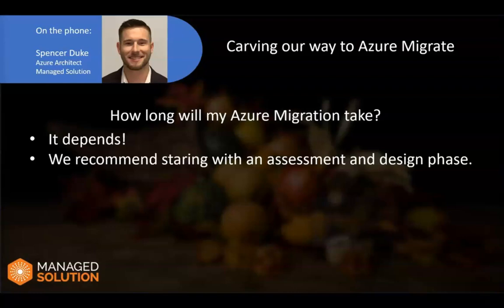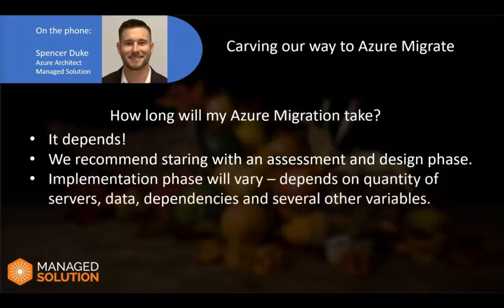And obviously, as far as how long a migration takes, it's going to depend on if you're talking about 10 servers or 1,000 servers. They're very different. That typical project process is probably a 3-month engagement on the shorter end, maybe 3 to 6 months. Again, so many variables go into making that kind of decision. But for context, if your environment's much smaller than that, you can decrease that time size. If your environment's much larger than that, you can increase that time size.